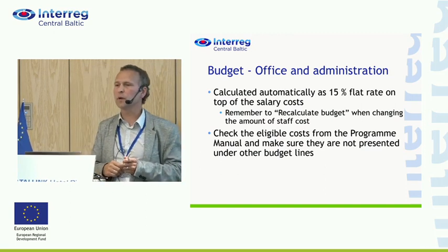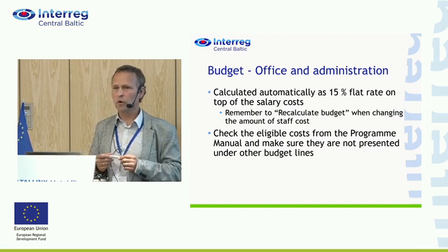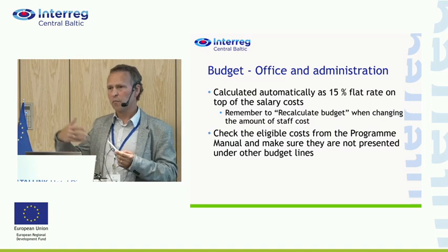What I forgot and now remember, under this office and administration goes overall accounting as well. I mean, paying bills or something like that. It is different from financial management. A financial manager for the project takes care of all project financing. That's one thing. It is allowed to have a special staff member, but just ordinary, regular accounting things, they are under the office and administration.